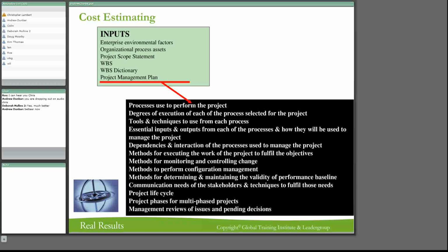On a lean one, do you need to do budget forecasting? Probably not. But if it's greater than 50,000, then you probably are going to need it. And if it's less than 50,000, you're probably also going to have some sort of budgeting cost. So that's around about the mark that you would start looking at budget forecasting. Even on a light project, there's not going to be a lot of contractual obligations, for example.